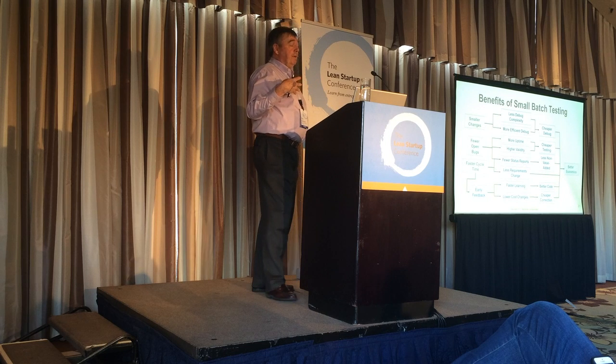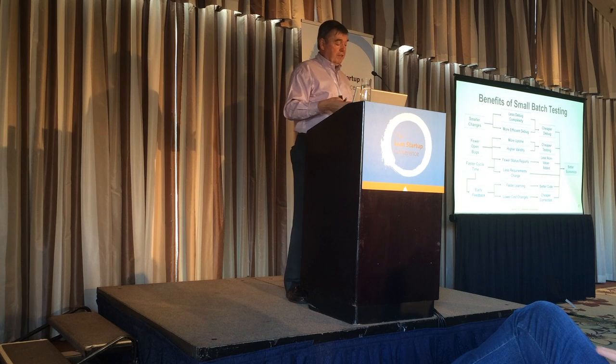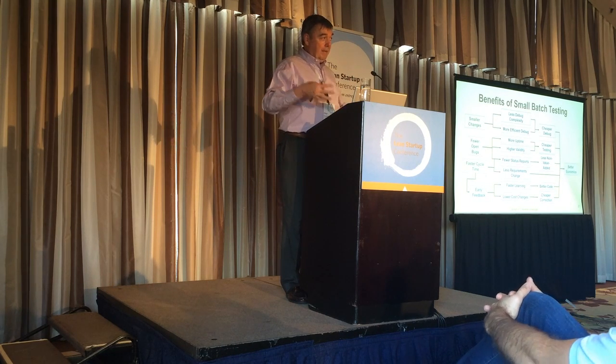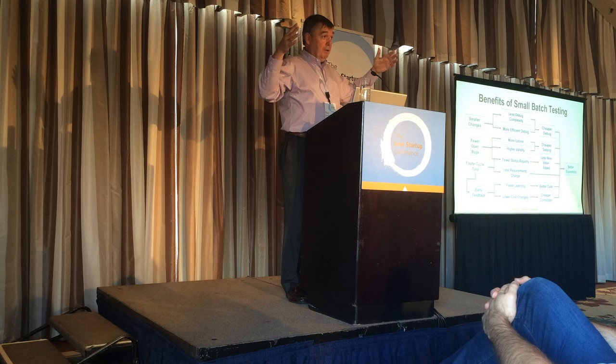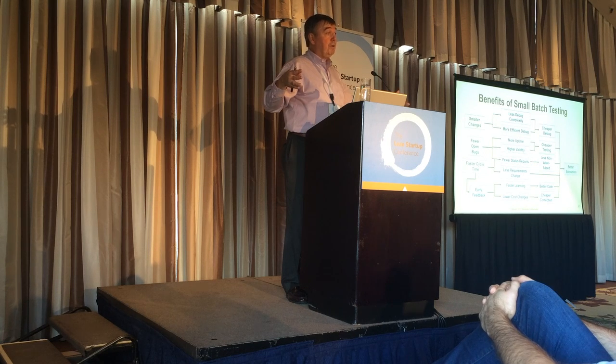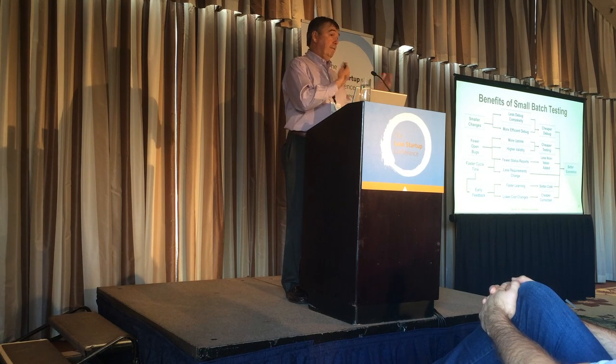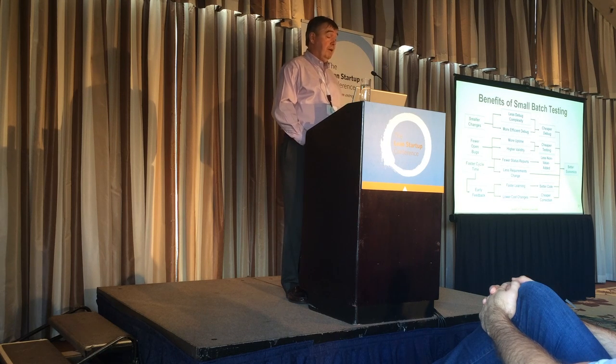I was talking with the team at HP, where they said, we used to dispatch bugs into our correction process as soon as we found them. We had so much inventory in the process that it was a long flow through time. We discovered that we were making fixes on modules of the code that were no longer in the product by the time it came out the other end of the process. So now what they do is they hold back the bugs in a ready queue. They only dispatch at the rate they have resources for. They have a fast flow through time, and their slogan is, we only work on fresh bugs in this process.